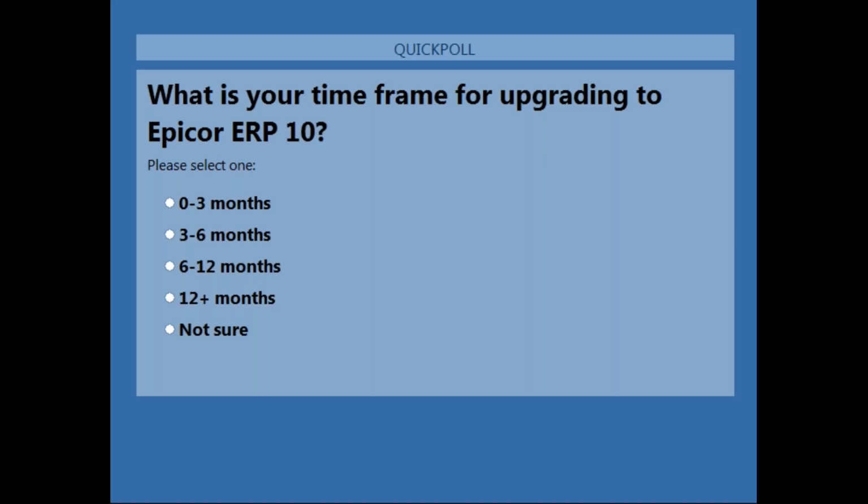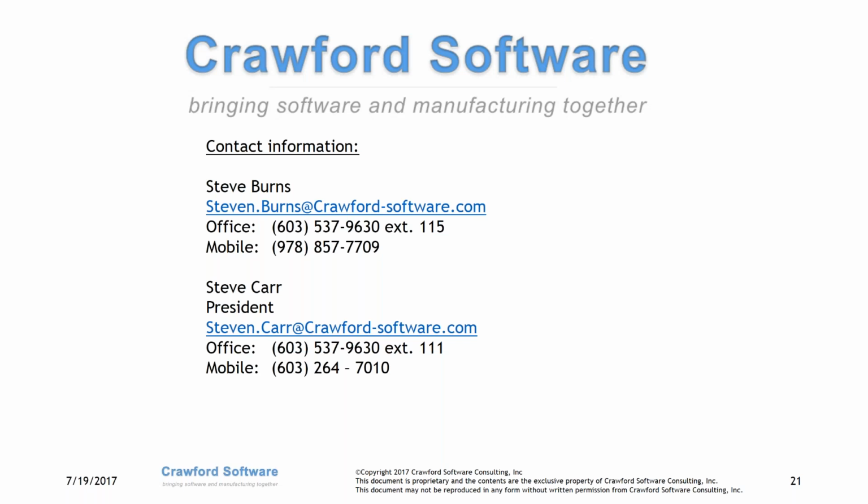Great. Another good question. What's the most time-consuming aspect of the upgrade? Same thing we've been talking a lot about, the customizations and all of that. Because everything needs to be opened, reviewed, and at a minimum the database names updated, the sheer hours and effort there is probably the longest time. Maybe not the costliest, but the longest in duration.